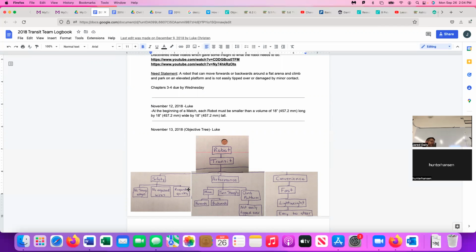And then you go on to the next big thing after research, which is design, we're going to design this thing. And we'll call it preliminary design, then we'll do final design. So you do preliminary design, and then you do final design, and maybe when you've got a final design, you have to report back to the client, and so you put that in there.